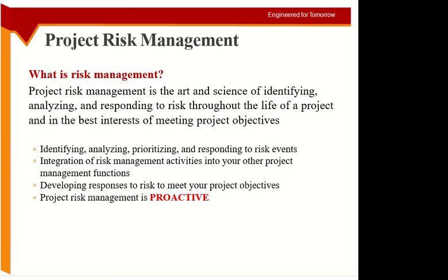If this thing happens, then what will I do? So if an equipment malfunctions, this malfunction will affect what activity, how much money I will need to repair it, who will repair it, and how much time it will take. This is your analysis. Identification of the risk is equipment malfunction. Analysis is how and what it will affect. And response is, when it eventually happens, what will you do? Who will you call? How will the equipment be taken to the workshop, and so on and so forth.